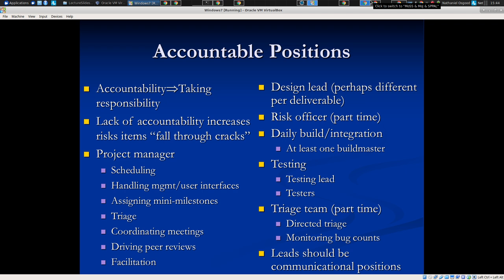I'll be able to show it at this conference coming up. And they build these plans around it, and then they get dashed. Whereas if you had said in the first place it's going to take 6 months, they'd say, oh, okay, I can deal with that. Too bad it won't be available for the conference, but we'll do it next year. So human theater often is unkind to project plans that are off base.